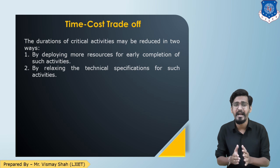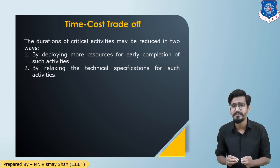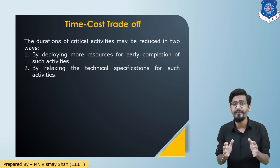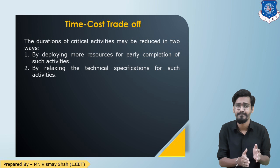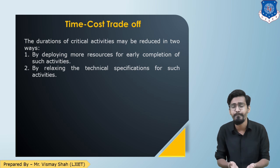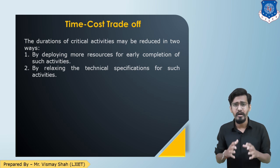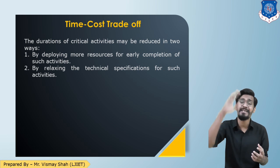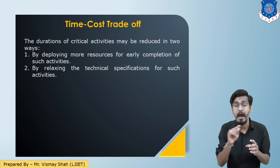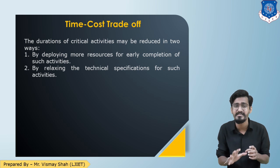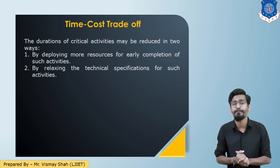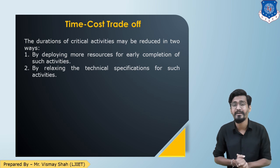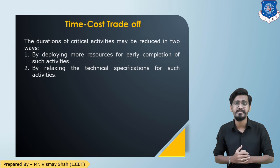Time-cost trade-off is trying to explain that if the project is of X days and now I want to finish the project in less than X days, I need to put extra resources. While putting extra resources, the cost is going to increase. But we cannot have an extremely high cost, so there is an optimum point of cost up to which we can reduce the project — that is what we are trying to find by time-cost analysis.